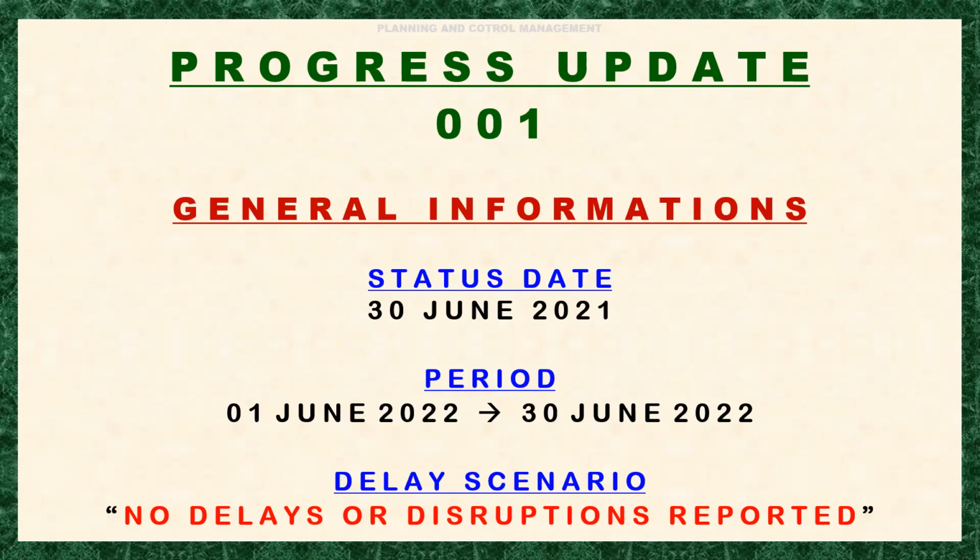What I mean is that these two sets of reports, site performance report and site resource expenses report, should be in monthly interval, where they shall reflect the activity progress and actuals of resource and expenses, and then report back the same to a project planner or scheduler in a monthly frequency.